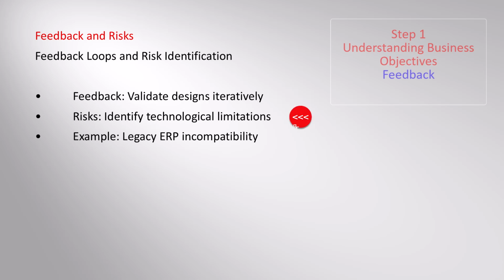Prepare for evolving requirements as business goals or project insights change. Risk identification: during requirement gathering, proactively identify risks related to stakeholder expectations, regulatory shifts, or technological limitations. This critical step ensures project success. For example, consider the risk of legacy ERP database incompatibility with Azure SQL Database, a technological limitation.